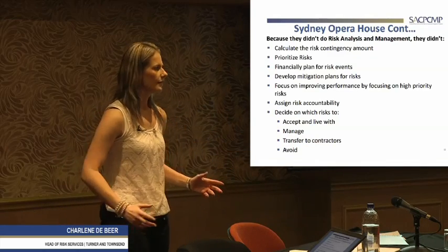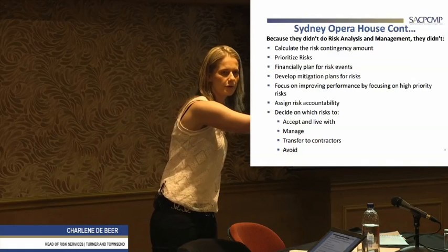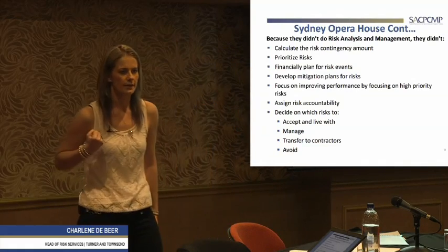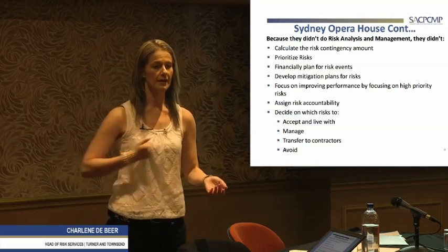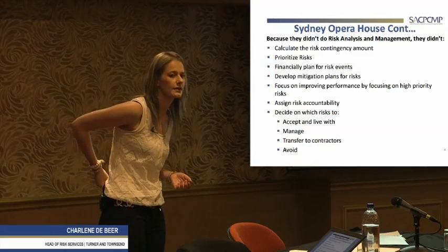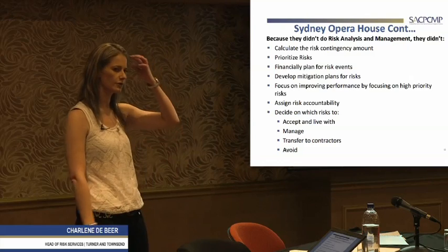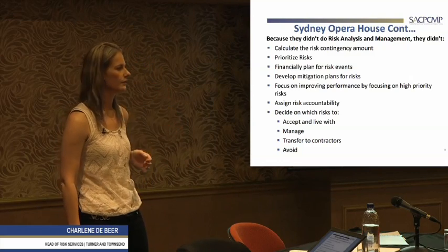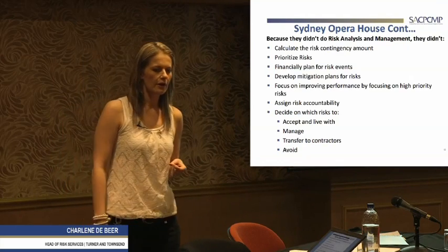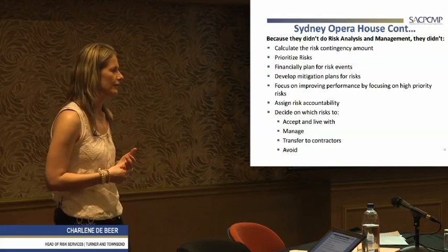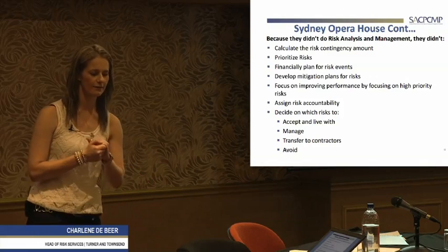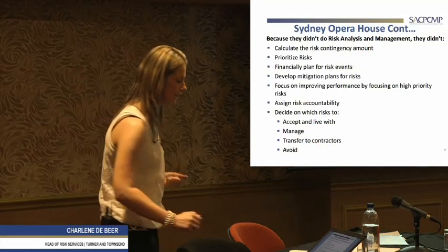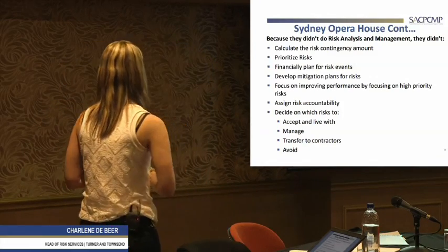It is just something you can't always maybe transfer to the contractor or accept it as a contractor. It's going to happen. It is what do we do to pull back schedule once it's happened and what the impact's been. So if it's 2 weeks or 2 months worth of strikes, what do we do then to recover on the schedule? So those are the things we have to accept and live with. There's nothing we can do, especially if it's a legal strike, which quite fascinates me in terms that you can actually just apply and it's legal.